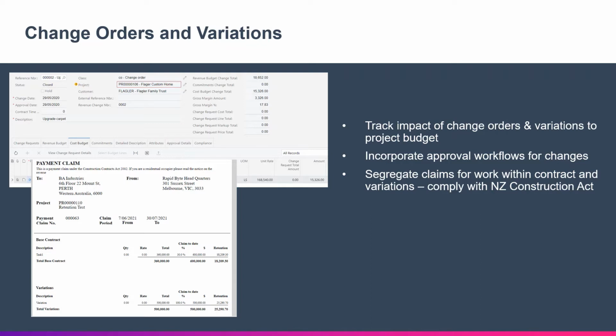The system also has been designed to comply with the New Zealand Construction Act. This requires a contractor to separate claim amounts that are part of the original contract and those that are from variations.